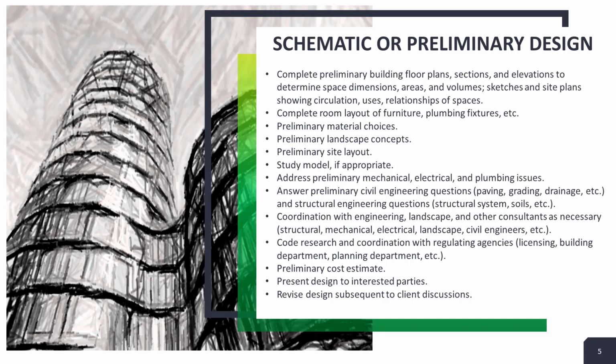The design will be shown in the form of schematic drawings or preliminary drawings, and in some cases, even a study model. So again, with our 3D modeling software, we can begin to 3D model the project. The schematic design will address all significant areas of design and will be reviewed with the client before proceeding with more detailed drawings. A preliminary cost estimate is also usually provided at this stage.